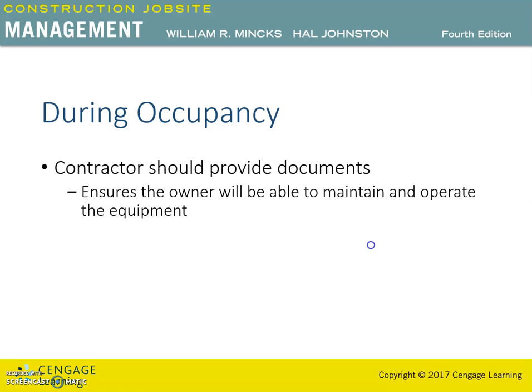The owner should be provided with all documentation and or training for schedule concerns or maintenance items such as air filters that will need to be addressed and executed by their maintenance people. As an alternate, the contractor can arrange for an outside vendor who will provide continuous service and filter changing into the future for the owner.